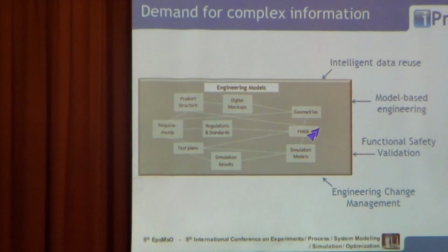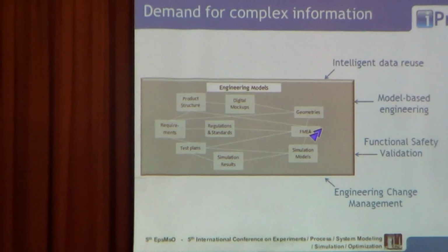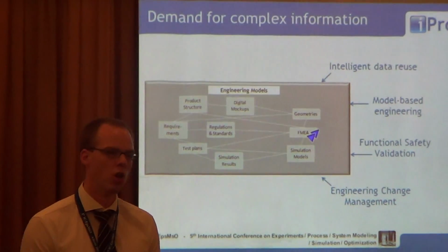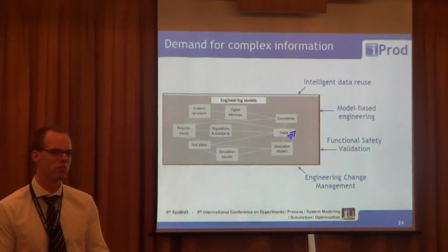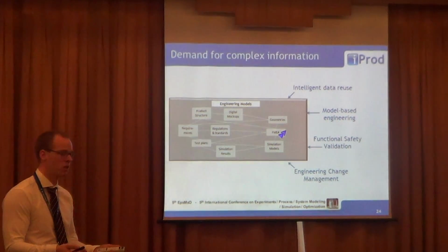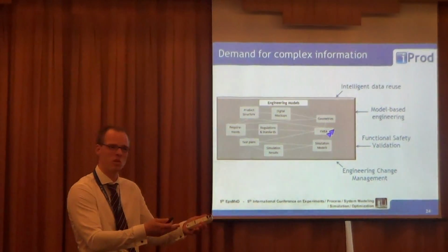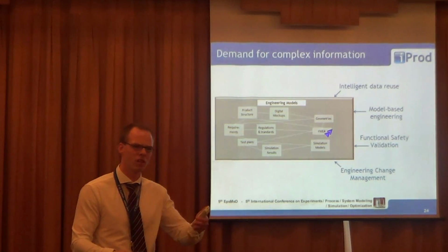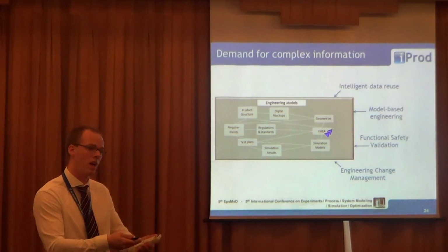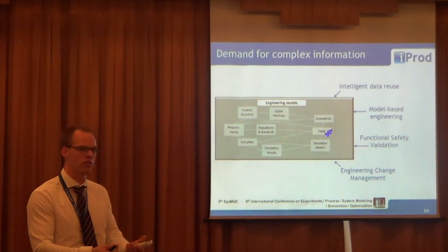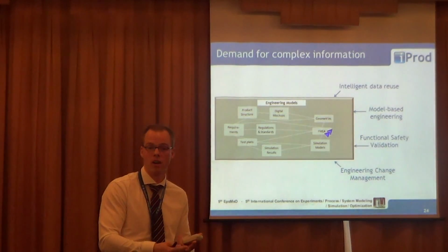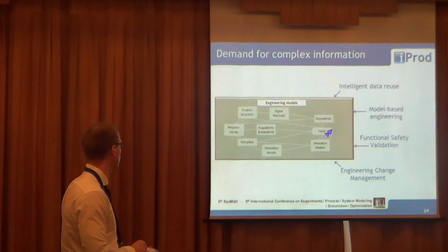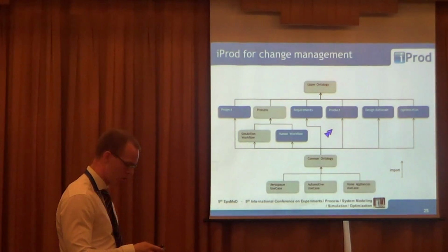That's engineering change management. Companies usually use it when you notice during development that there's some item that doesn't work the way it has been specified. You would like to change it, but it has already been released in the specification, so you cannot simply change it. You have to formally ask for it and say, I would like to change this item, and then the experts will try to analyze how this change would affect the schedule, other product structure elements, testing, etc. So all this has to be found out. And this is a change management example.